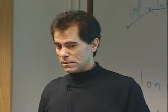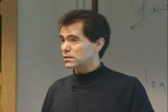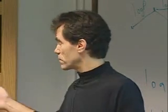But a lot of times the programmer or project manager has to say, well, I'm going to suck it up and make the change for that small eventuality, or I'm going to risk it based on cost and try to preclude that eventuality from happening. So a lot of times it's not cut and dry, it's a guessing game, a balance based on judgment, past performance, and a lot of other factors to say, boy, that's such a low probability of occurrence that I'm not going to worry about it. And that threshold is never defined. You have to define it as a project manager.